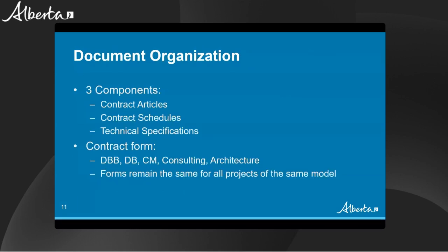In terms of the document organization, we modeled them largely after CCDC, RAIC, and Infrastructure Ontario organization principles. So we have the base form, supplemental schedules, and technical specifications. The use of Master Format specs for technical components is preserved. Some concepts from the Master Format sections are realigned into the supplemental schedules. All terms within the contract articles will be standardized. All contracts of the same model will use the same articles setting out the basic terms and conditions. All project-specific provisions will be in the supplemental schedules and technical specifications.